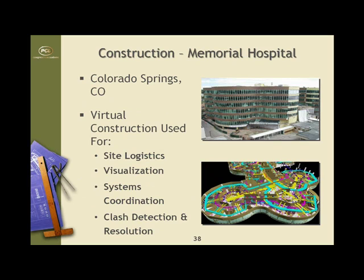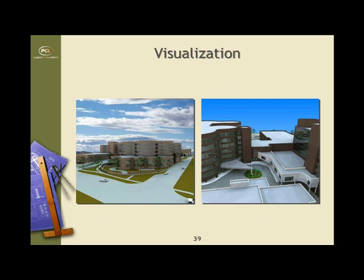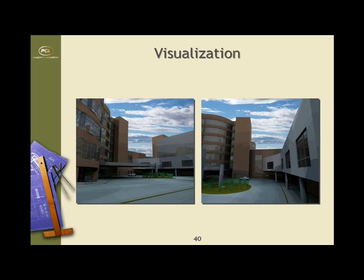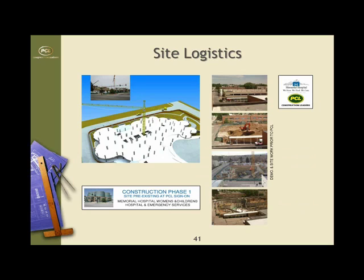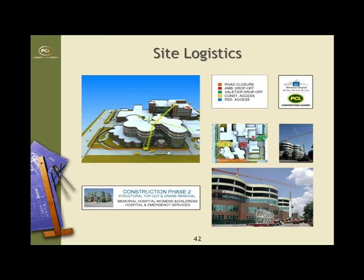Our next example is during the construction phase. This is Memorial Hospital in Colorado Springs, Colorado — actually our first project that we really used virtual construction for. We have some quick renderings that we used to work with the client and the designers. Site logistics were very important on this project because when we showed up to site we took it over from another GC, and it's also an expansion to an existing campus. We put together site logistics boards to show the project team how all of this process is going to work.